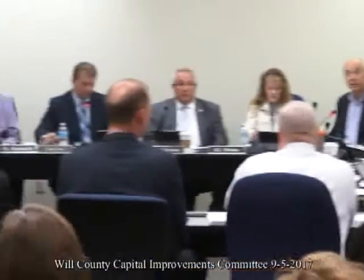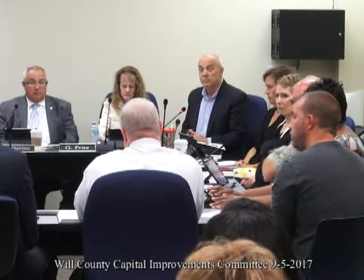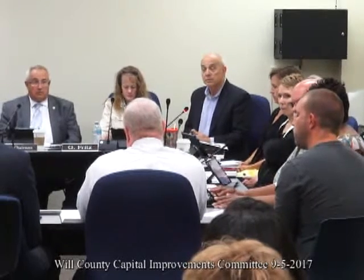I think AT&T has started their work. They have. The permanent relocation down on the south side, on that southeast corner, and then they're going to run west along the south side of the site along Washington. So they have started that. Dave's been pushing, we've been pushing them, but they're critical to getting all that in so that they let us demolish and replace the existing copper and fiber optic on the site. So I think we've probably got a better comfort level with AT&T now, with what they've got to do, because they're the star of the show as far as getting everything off the site.